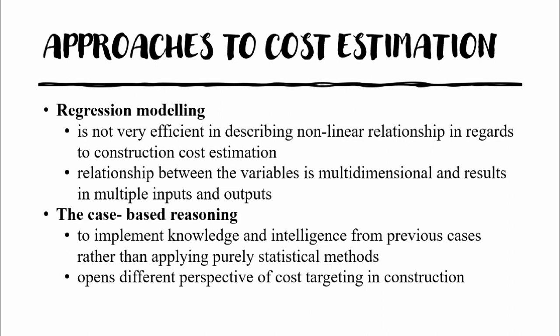The major idea behind the case-based reasoning method was to implement knowledge and intelligence from previous cases rather than applying purely statistical methods. Case-based reasoning gives direction toward tailored software packages used by different companies in the industry to estimate preliminary construction costs.